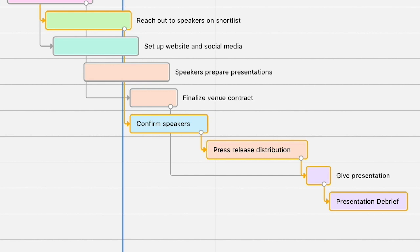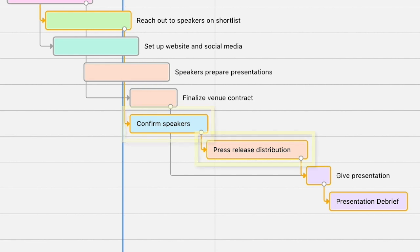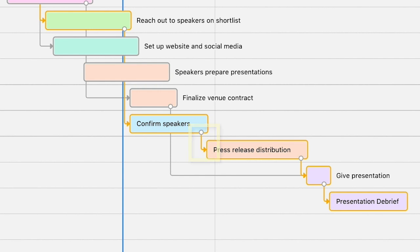In many cases, a project plan will require that activities be performed in a certain order. For example, if you were planning a conference, you would have to finalize the keynote speakers before distributing the press release. A Gantt chart will let you visualize how different activities depend on each other with arrows, called dependencies, connecting the different bars.